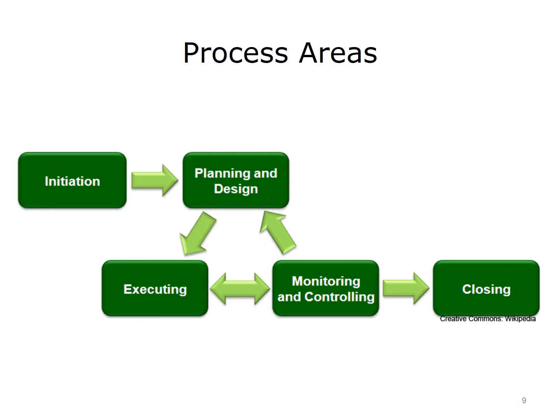During the implementation stage, the manager will target the project staff, process, activities, and resources toward the project objectives. The monitoring and controlling stage includes supervising this entire execution while constantly reviewing the current outcomes against the project plan and defined baselines, and controlling for risk. Finally, the manager presents the final deliverable for client acceptance or approval during the closing stage, while finalizing the project processes and activities.